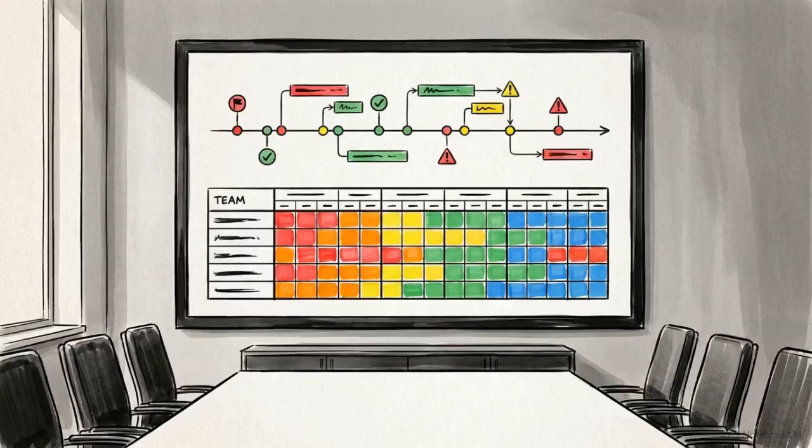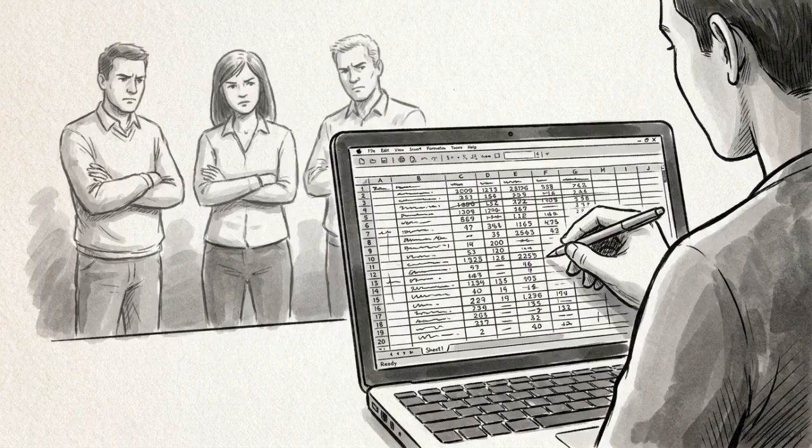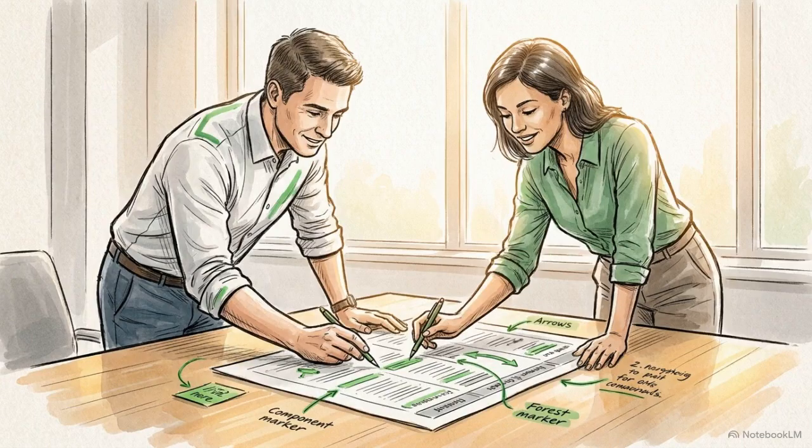The final step is to keep it visible. Export your fully leveled allocation data and attach it directly to the schedule you present to leadership. Do not hide your leveling decisions in a private spreadsheet. A schedule that masks resource constraints turns unspoken trade-offs into silent resentment across the team. Publishing exactly who is assigned where and why forces productive conversations to happen early.